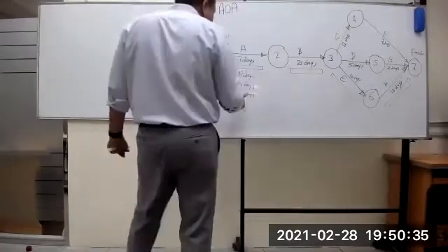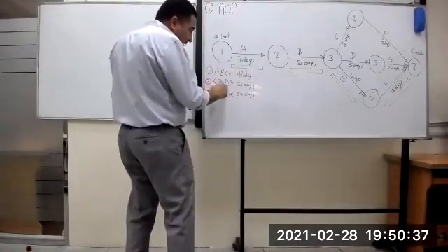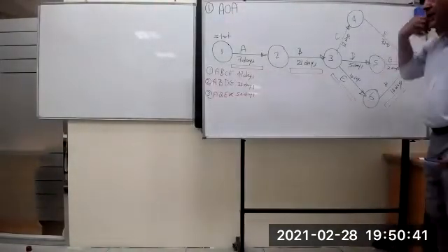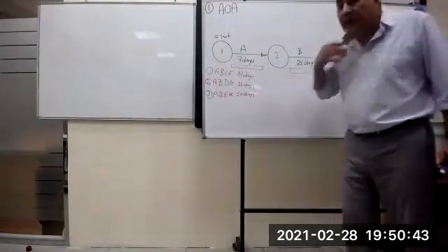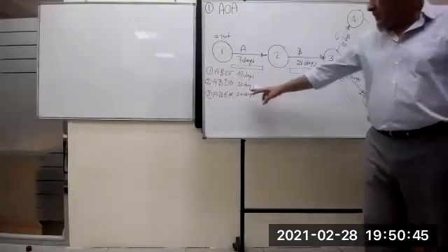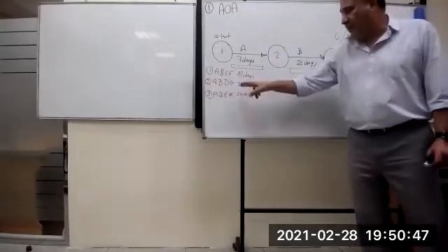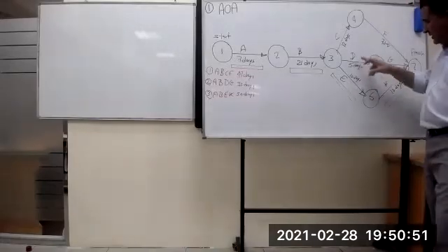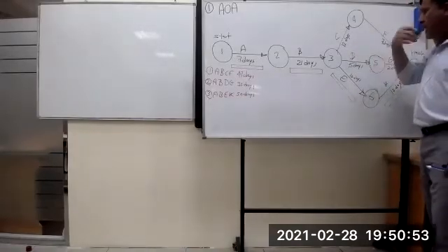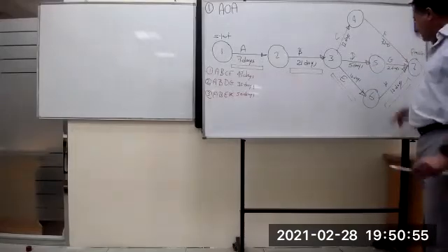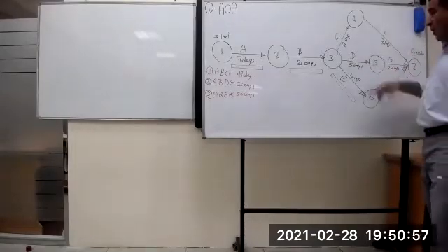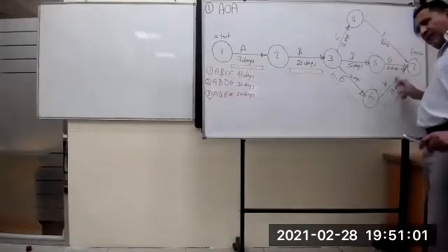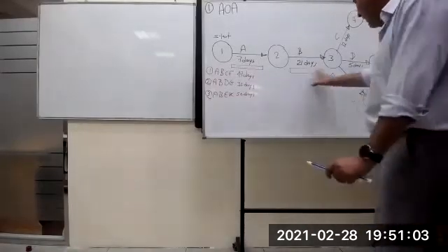But what about A, B, D, G? Means what here? This is very nice. We have 15 days: this is 35, and 50 minus 35 is equal to 15. Means these activities can be delayed 15 days. And this activity can delay 15 days, or this 5 days and this 10 days, or this 10 days and this 5 days. Okay.